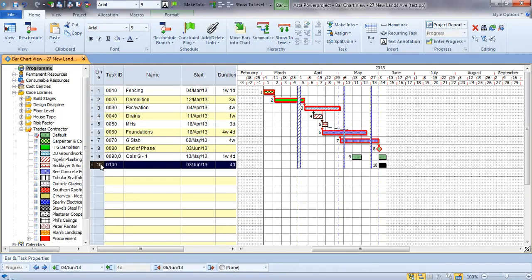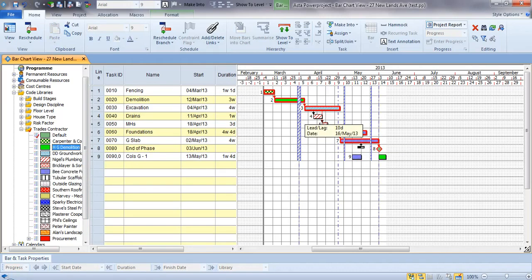There's no limit to the number of activities that you can have on one row. They are different activities in their own right. They can have a different activity code, they can have a different resource and cost, they can have a different logical arrangement. They're not pseudo tasks in the same way they are in Microsoft Project, and the ability to do this helps us condense a lot of information at one time.